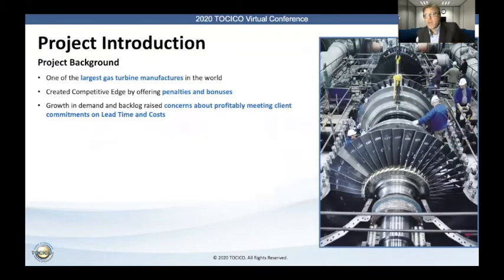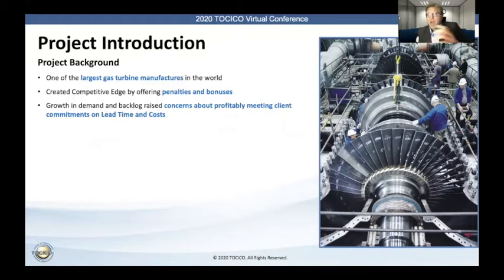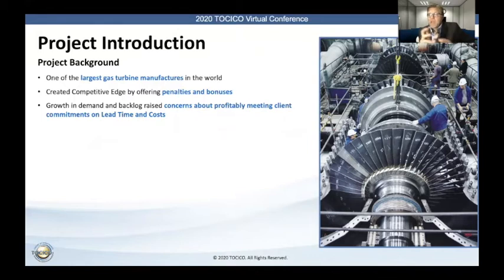So let's go back to the case study that was the objective for this presentation. A couple of years back through one of our partners, we were approached by one of the largest gas turbine manufacturers in the world. They said they had created a competitive advantage by offering penalties and bonuses. They had a fantastic pipeline of programs to be delivered — about a five-year pipeline — and they expected just over $120 million of profits from this. But they were about a year into this and had some concerns: there were already some delays and rework that had to be done, and they were worried about whether this would require them to change their commitments on either lead time or cost to their customers.